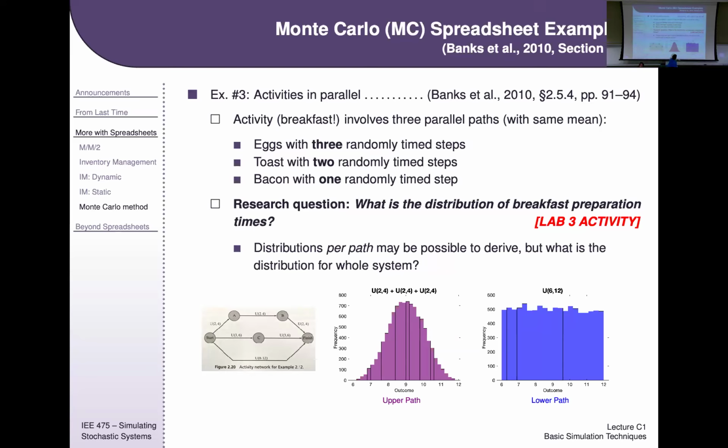So, just a reminder, this is 6 minutes. This is 12 minutes. This is saying the bottom path is equally likely to take 6 minutes, 7 minutes, 8 minutes, 9 minutes, up to 12 minutes. It's equally likely to take any of these. This one, this is 6 minutes. This is 12 minutes. This one's saying it's not likely to take 12 minutes, but it can. Not likely to take 6, but it can. Much more likely to take 9. So with that in mind, why might you think you'd be more often waiting on this one? Yeah.